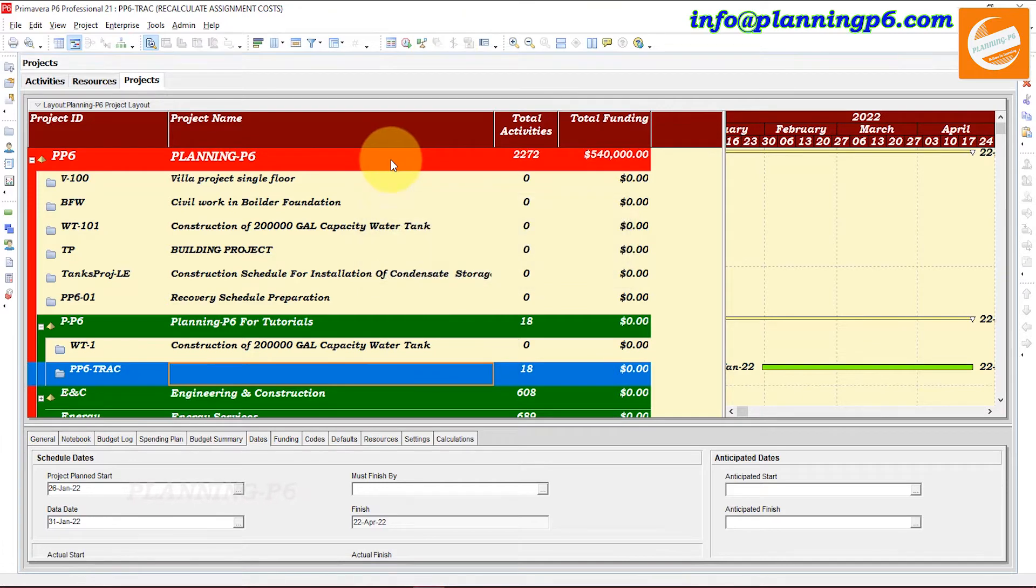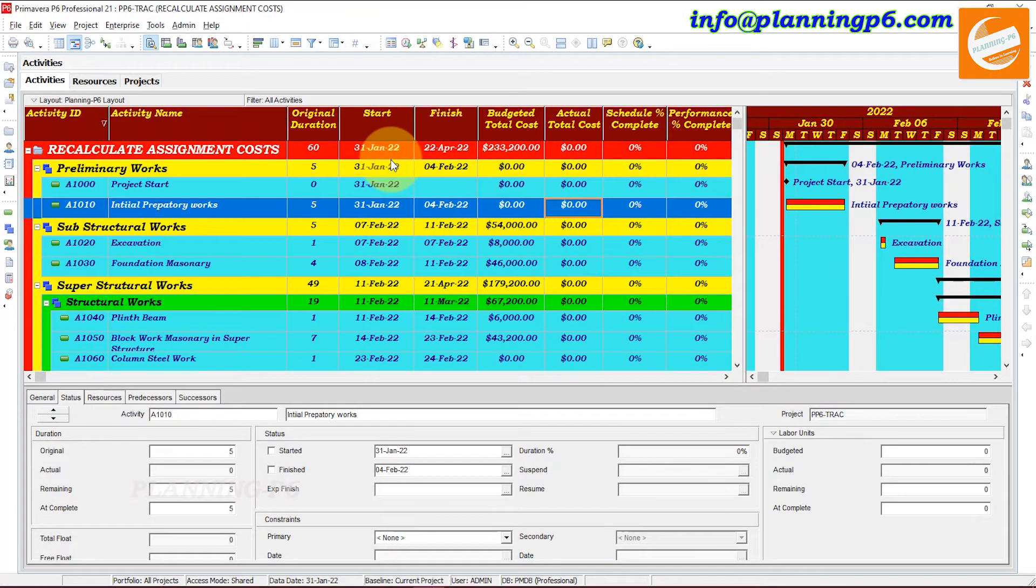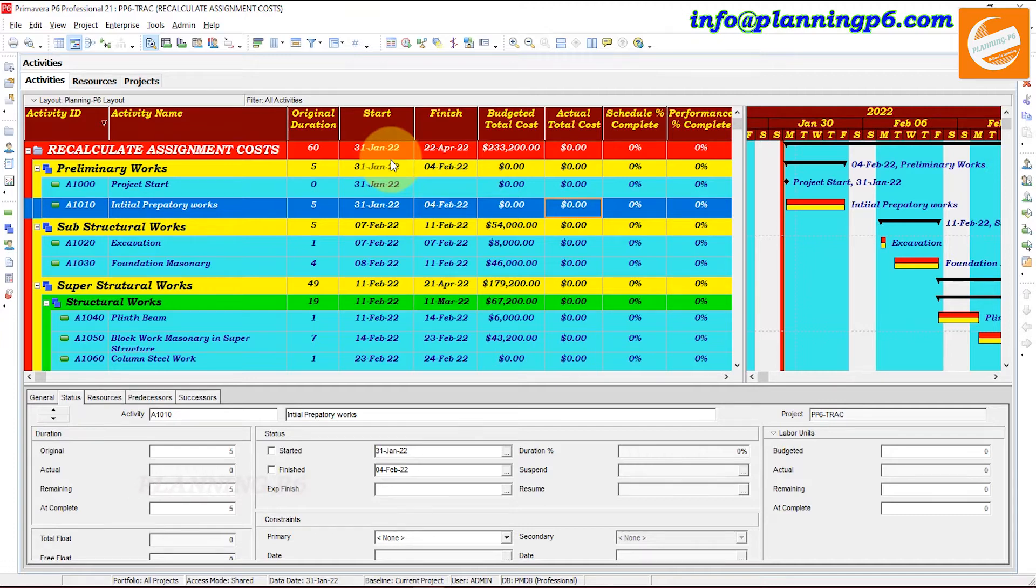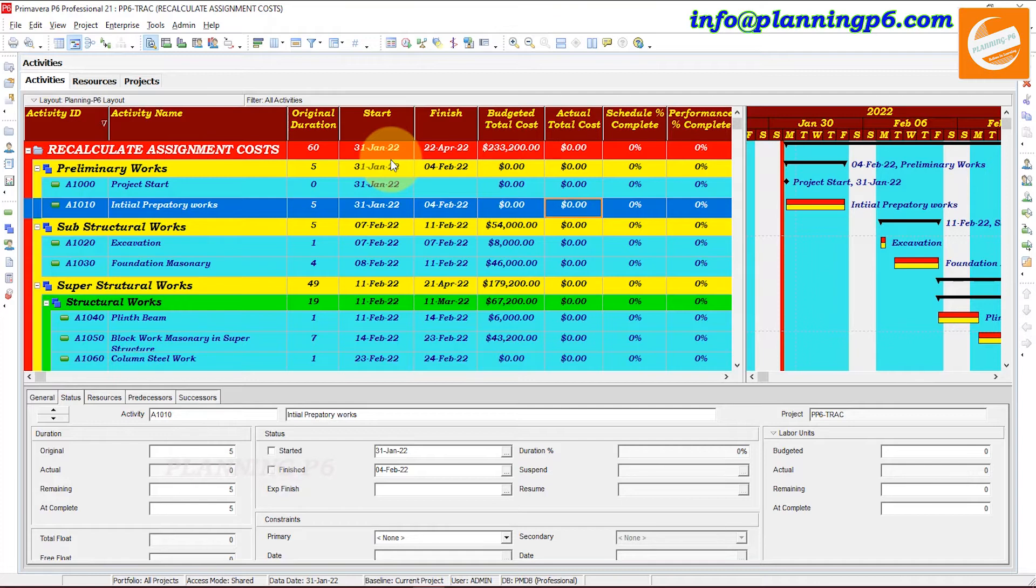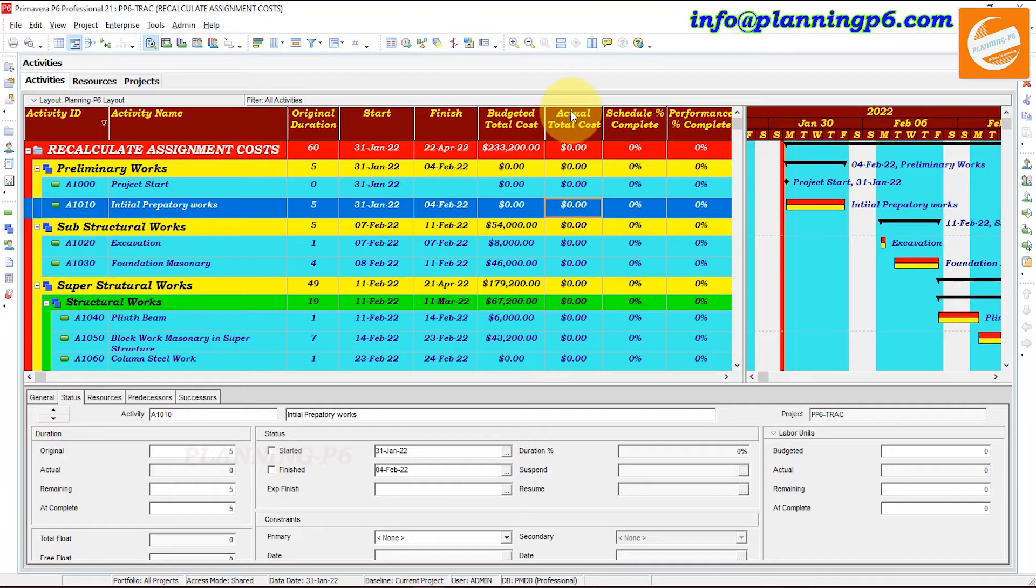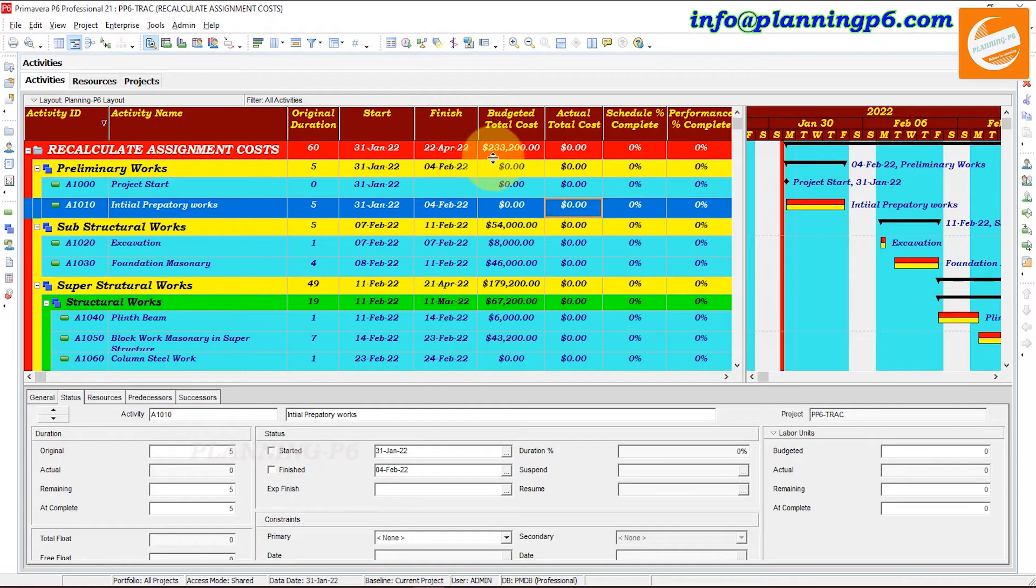So when the changes are made to resource or role cost information, you are prompted to recalculate assignment cost so that the correct value displays for the activity cost in all open projects. The recalculate assignment cost command ensures that the project costs reflect any updated price per unit values on activities. Actually the same resource which you have used in different projects, that will be reflected in your budget total cost. Whenever you will update the resources cost or time, then the cost will not be updated by Primavera itself.